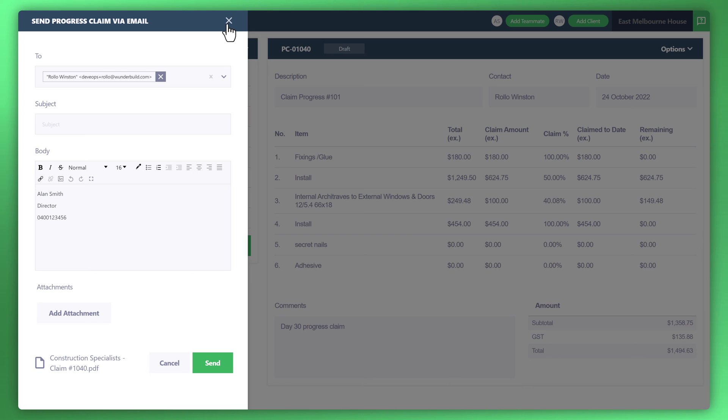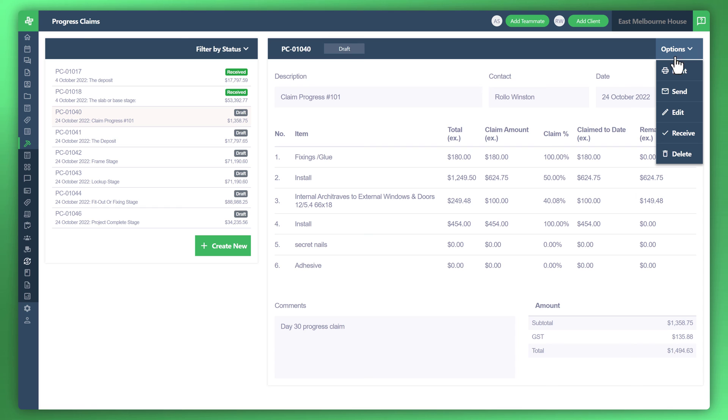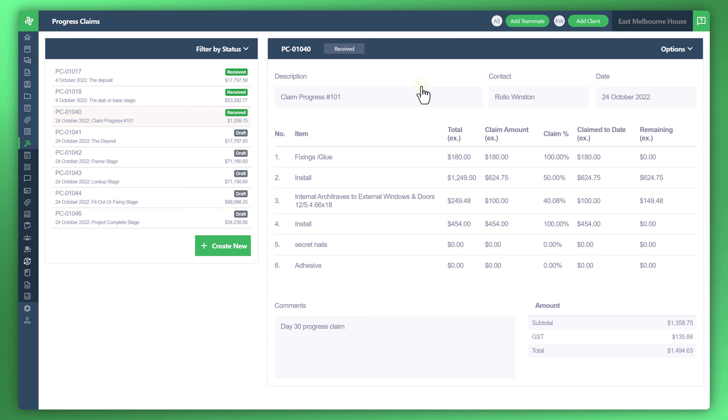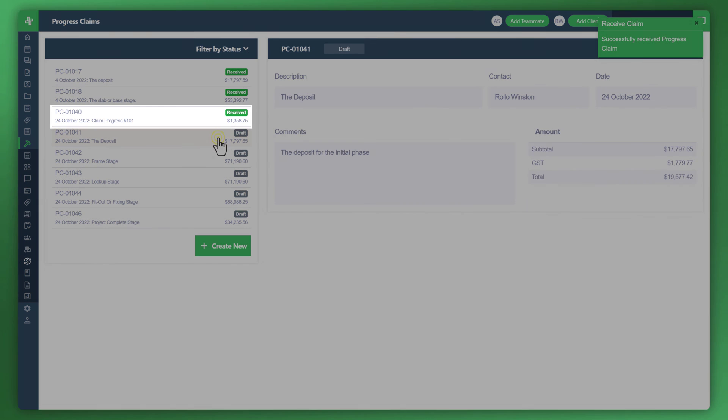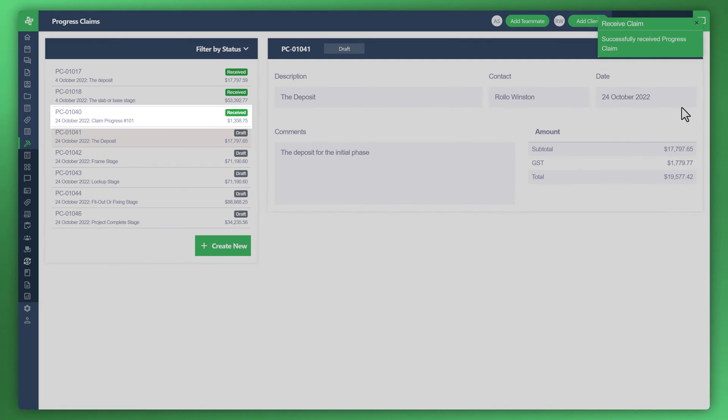Let me show you how you can mark the progress claims as received. Back to options. For instance, the customer's paid the invoice. You can now manually mark it as received. Make sure you have received the invoice. You cannot undo this step. You'll notice on the left side that particular progress claim has been received.